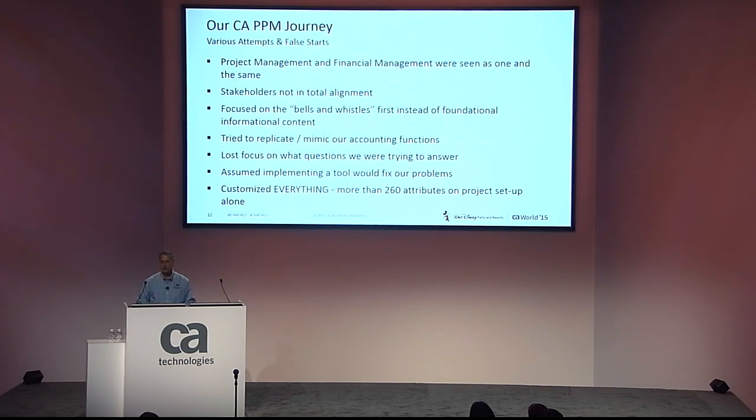Furthermore, one of our challenges over time is that we tried to replicate or mimic our accounting functions in the PPM tool. As many of our stakeholders were from our finance organization, when they were dissatisfied with functionality coming out of SAP, they tried to mimic and recreate it and deliver what they needed out of the portfolio management tool. So part of it was creating a false optic in terms of how the projects were performing, because they were trying to compensate for things they felt they weren't getting out of the appropriate platform.